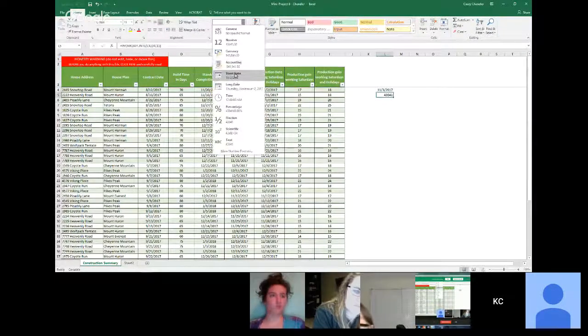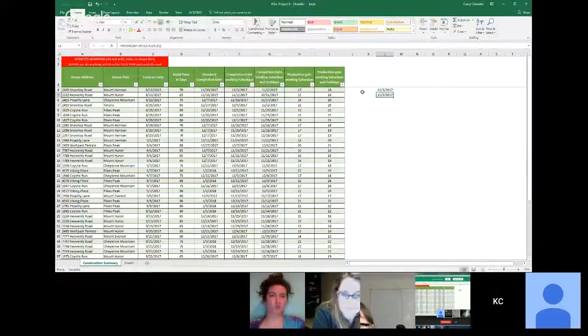Now, here's the fun part. Be careful with some of these, and notice it's the same date there, because some of the holidays may or may not fall inside your formula calculations. What I mean by that is the start and completion date, let's say it's 50 days, and there are no holidays within those 50 days, so those two numbers may match.